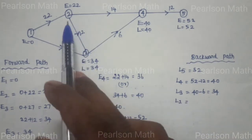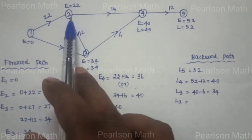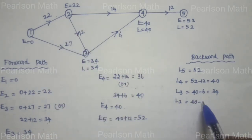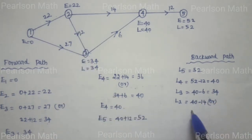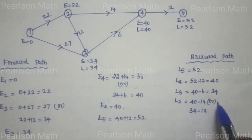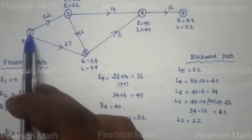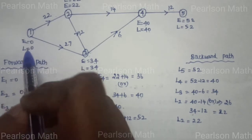Now for the backward path, L2: we have two possibilities, 4 to 2 and 3 to 2. First 4 to 2: 40 minus 14 equals 26. Next 3 to 2: 34 minus 12 equals 22. The smallest number is 22, so L2 equals 22. Then L1: 22 minus 22 equals 0, so L1 equals 0.